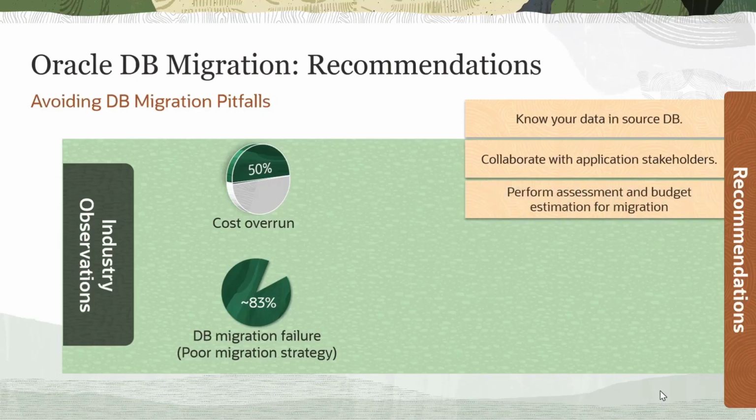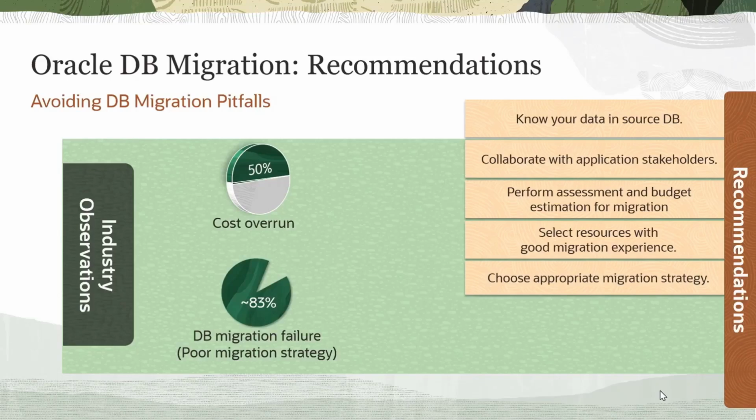Evaluate the efforts needed, how many resources are needed, new expenses to be borne, and project hours to estimate the budget size for the migration project. Identify resources who have good technical expertise with database migration. Set up a project plan detailing the migration sources, the appropriate method to use for migration based on the source, the order of execution, and the timeline for completion.